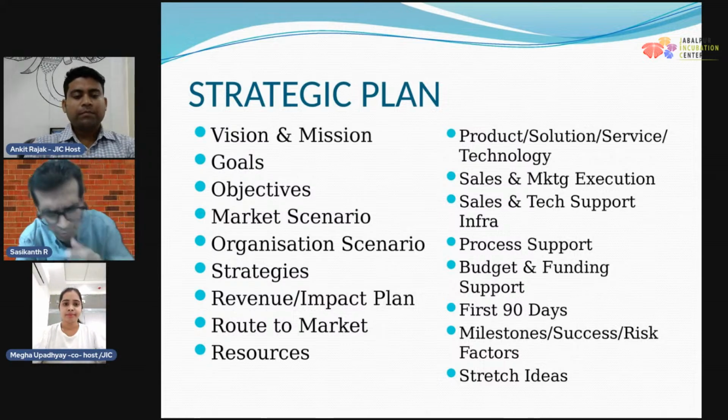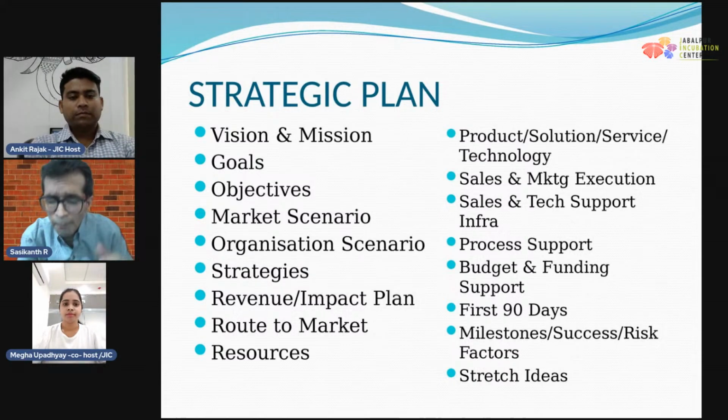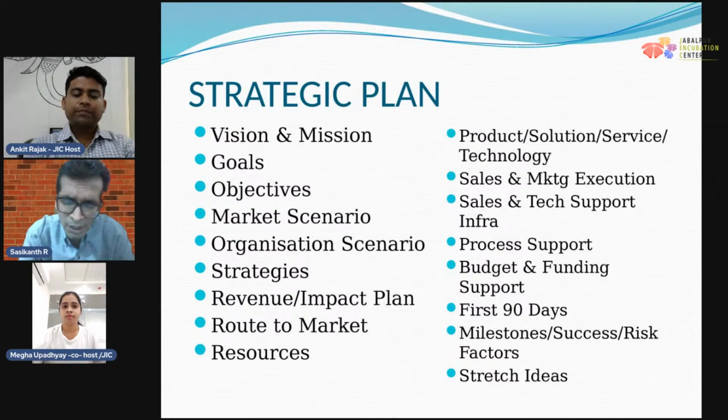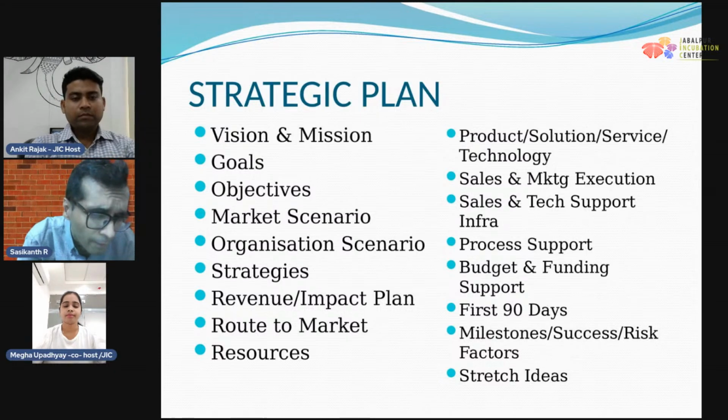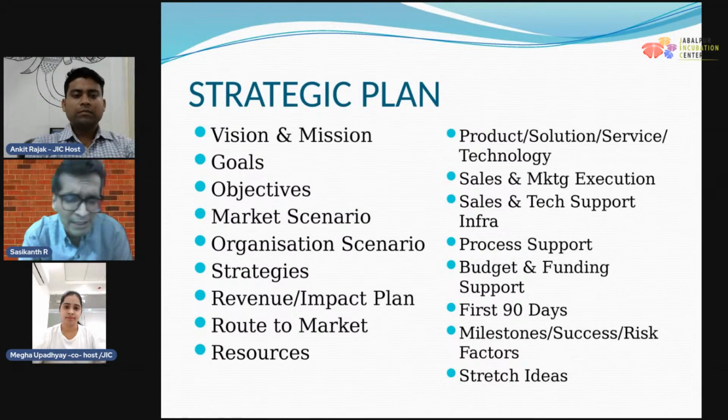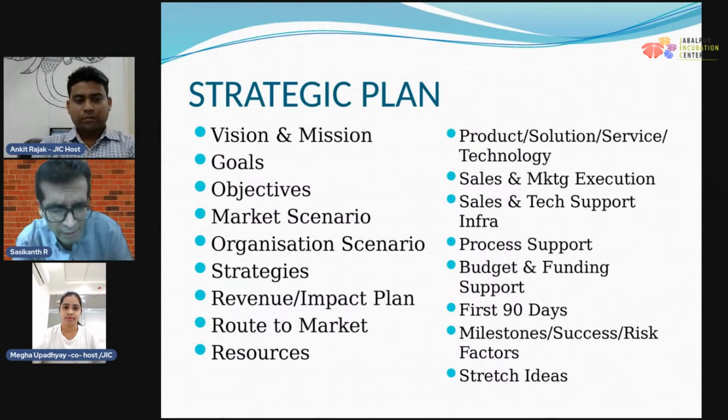And there are some risk factors where probably you will not be able to do anything about it, but it's important that you're aware of them so you will know what kind of action plan you need to take. For example, if there's going to be a total shutdown again, how many people will operate from home, how many key people will need to be at the site. Those need to be planned so that when an emergency happens, when there is a sudden COVID lockdown in the city or the state, you must know what kind of mitigation plan you will use to overcome the closure of the city or state, whatever happens at that time, right?